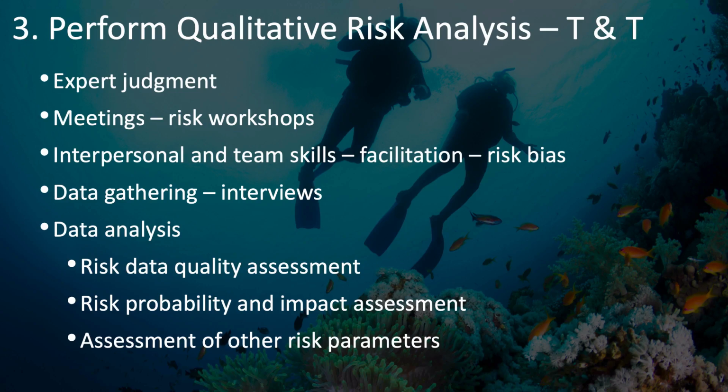You'll also be using some data analysis skills. Risk data quality assessment, which is simply an assessment of the quality of the data you have regarding different risks, and whether or not you're using high quality or low quality data and information about risks as you're doing risk assessment. Also, risk probability and impact assessment, which is a key feature of qualitative risk analysis, in which you assess the probability and impact of each risk, and from that derive the priority. Also, you have assessment of any number of other risk parameters.